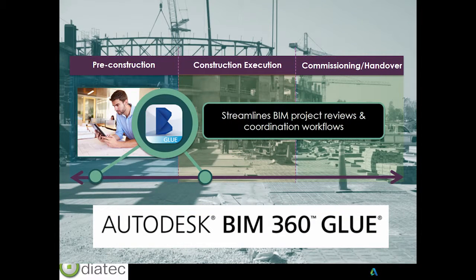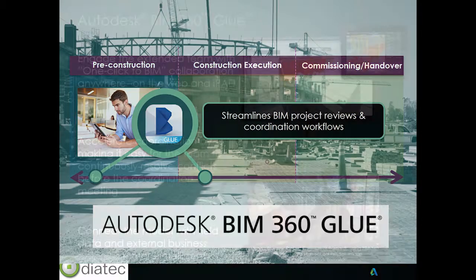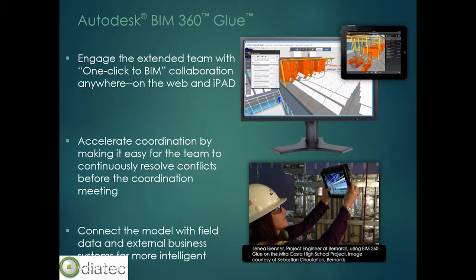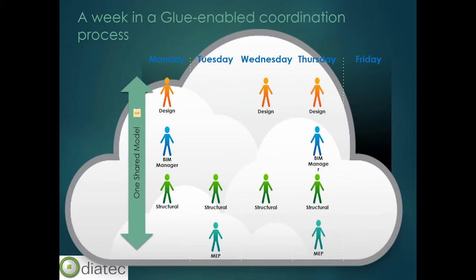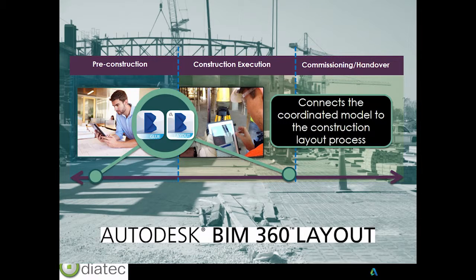When we look at Glue, it spans across pre-construction into construction execution and works on multidiscipline coordination. During the phase where a constructability model is being created, each member of the design team has an opportunity to review, discuss, and analyze what's being done across multiple disciplines. We can coordinate singular models into federated models and view them through the Glue viewing tools — redlining, markup, and viewing from anywhere, even on an iPad with the Glue application. Accelerated coordination means teams aren't waiting extended periods for issues to be resolved. Members working off a shared model can coordinate at different times throughout a working week rather than working independently.